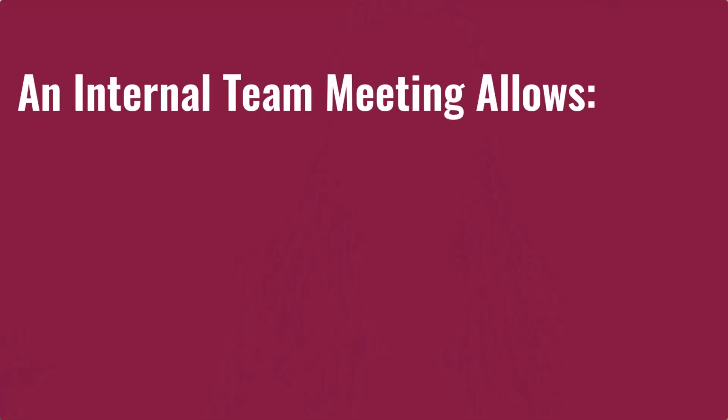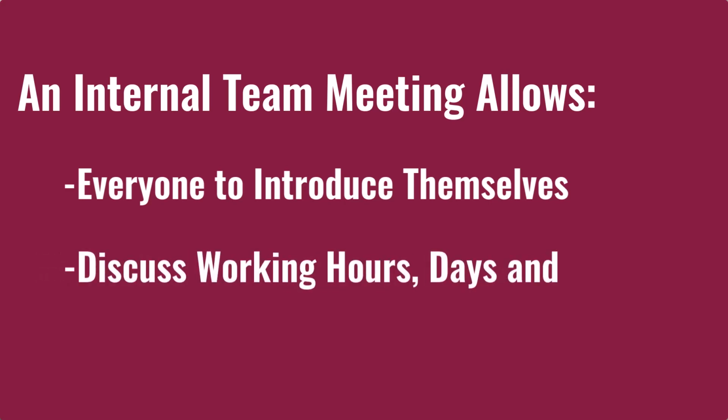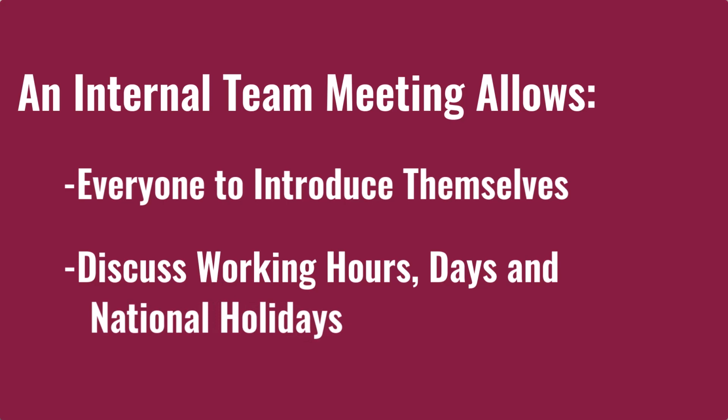During that meeting, it would be great for everyone to give introductions, a little bit of background about themselves, and then it would be great if they could identify and outline their typical working hours, their typical working days, and any national holidays that they have in their countries that could be used for planning.